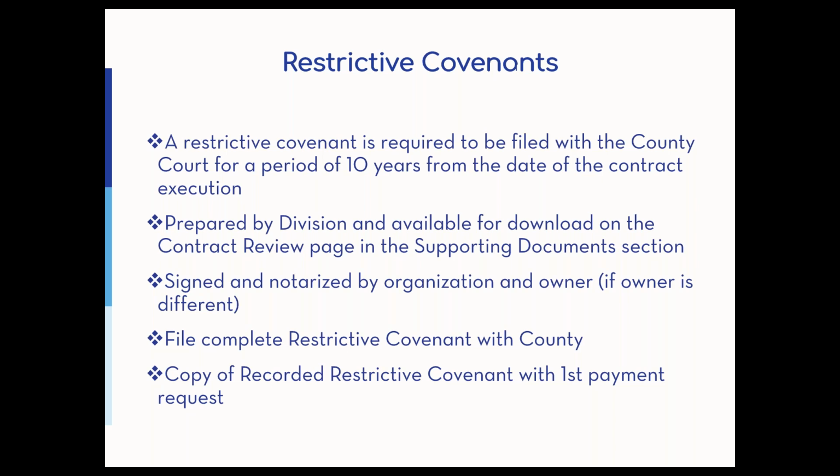There is information about the restrictive covenant and a surety bond option should you choose to go that way in the agreement in clauses 18 and 20 and attachments C and D. If you want to know more about the surety bond, just contact me directly. Typically, those have a fee attached to them through your insurance. The restrictive covenant only is the cost of recording the document.